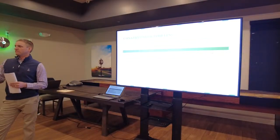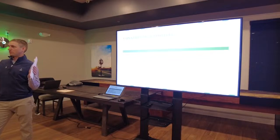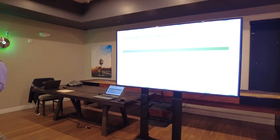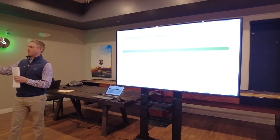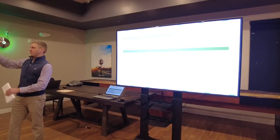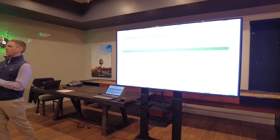So, what we faced this year with this flood intake was a 2-month lead time on a pump, and then a month lead time on the propeller, because it's that flood intake. With the new system having 375 horse vertical lift pumps, those are more readily available. Cities use them, ag uses them, industrial uses them. So those are more readily available.